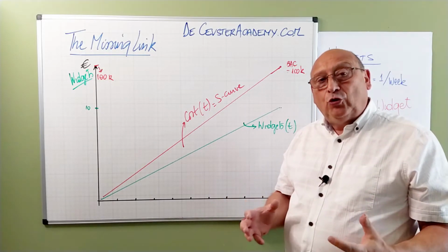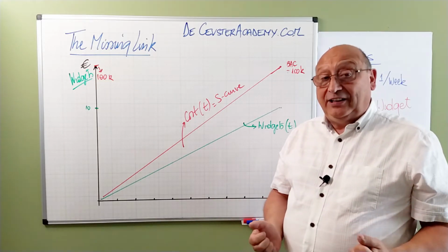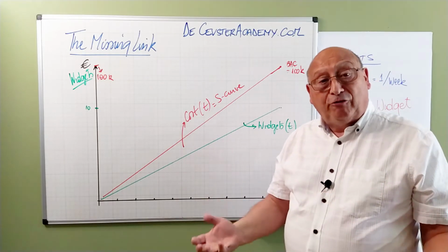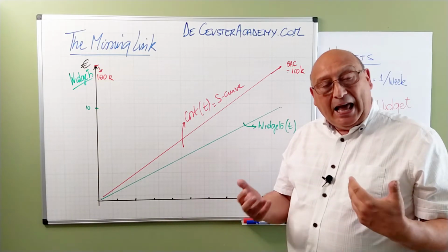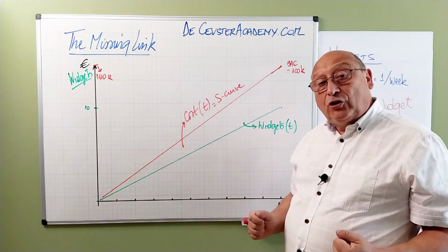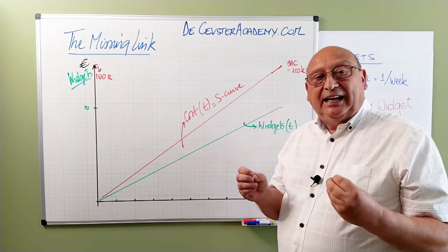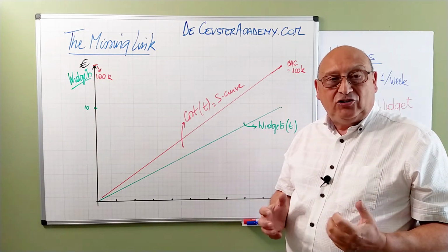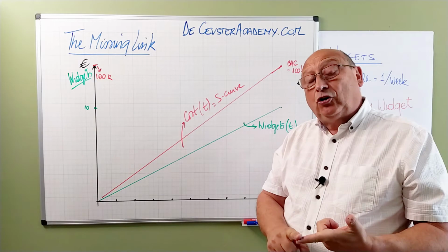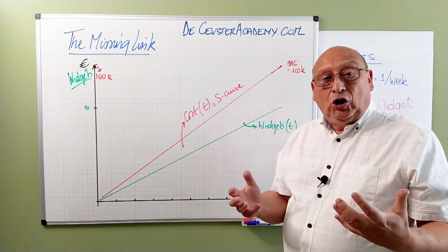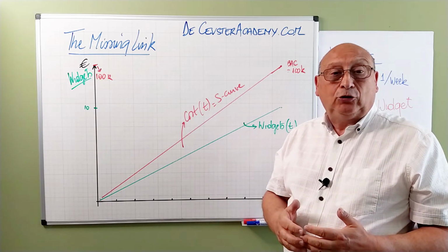And the combination of these two is very important when we will be looking into earned value management. Basically, we will be measuring two things. We will be measuring the number of widgets that we create over time during the project, and we will measure the cost. And those two elements we will compare to the S-curve. That's in fact where earned value management is going to help us, by understanding that the S-curve has that double information included in it. Schedule information, because we plan the deliverables over time, and the cost information. And it's very useful to put everything in cost as the main parameter, because we will be able to compare the different information that we obtain during the project execution.